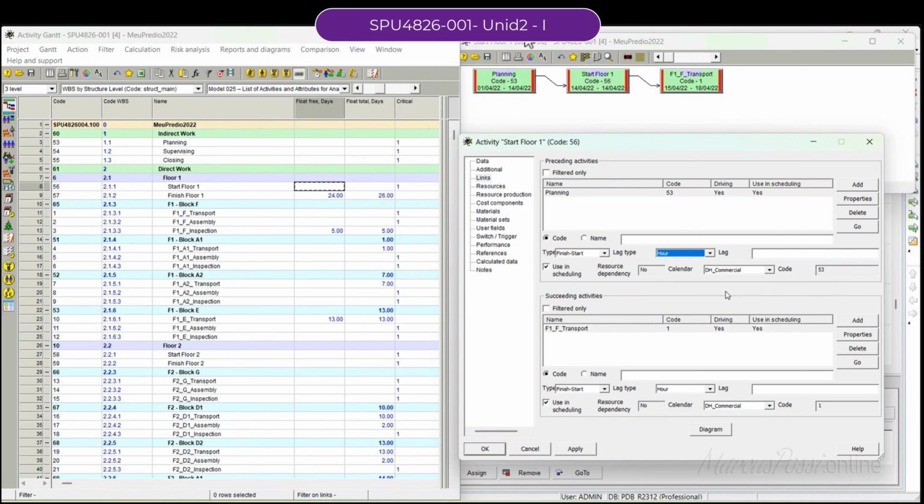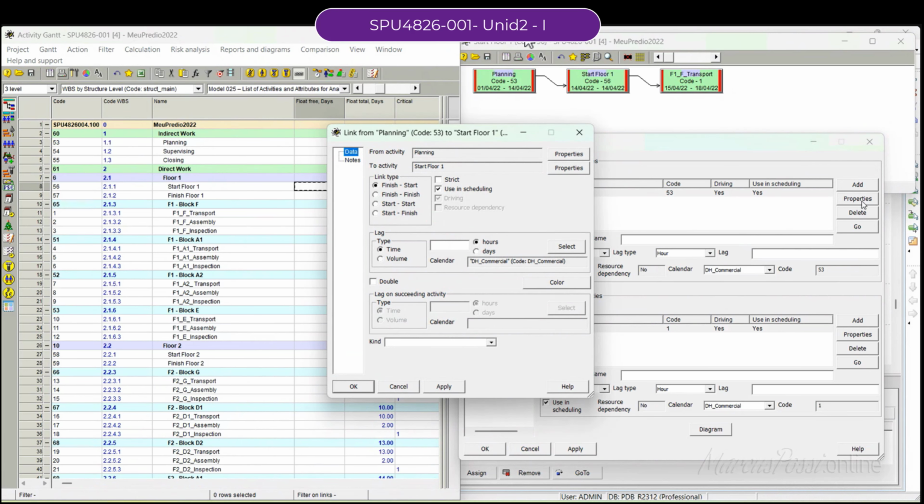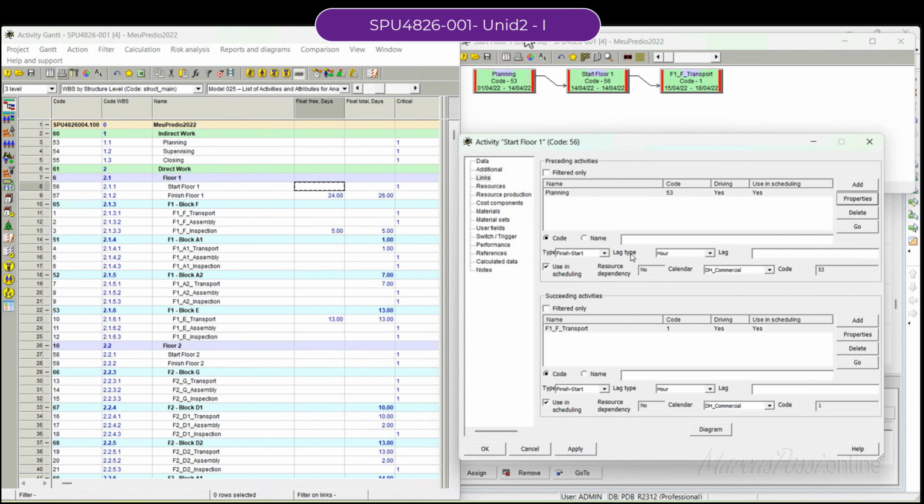So instead of saying start to start after 1 day, you may schedule start to start after painting 50%. That means if I do not paint at least 50%, regardless of the time, I cannot start the next activity. Because you may start something today, and 2 days later imagine to do something, but you cannot because you have not done anything yet before the second one.